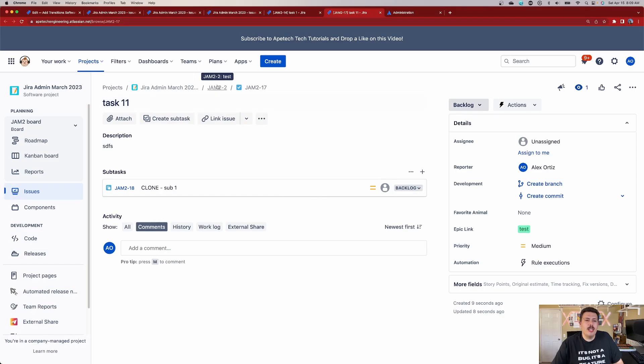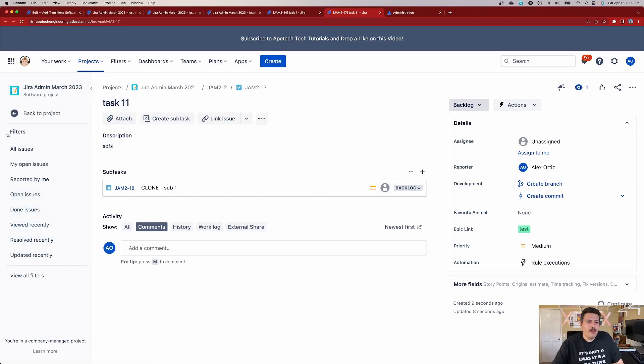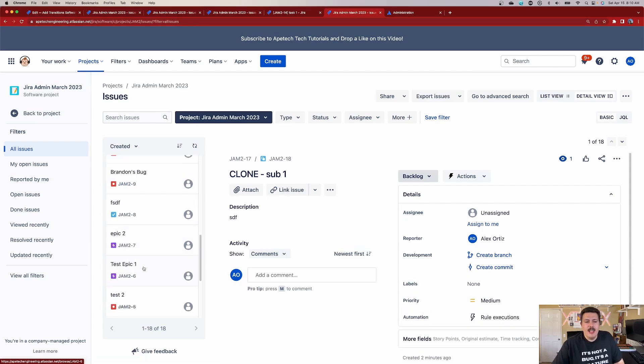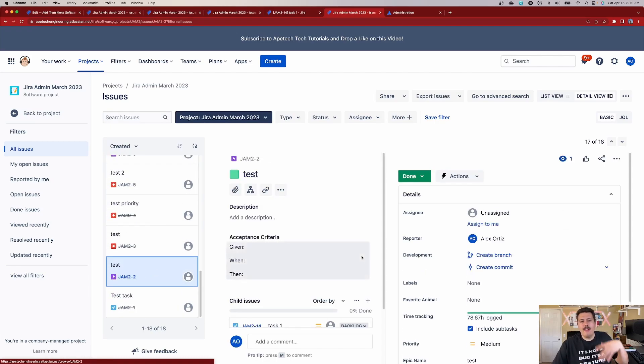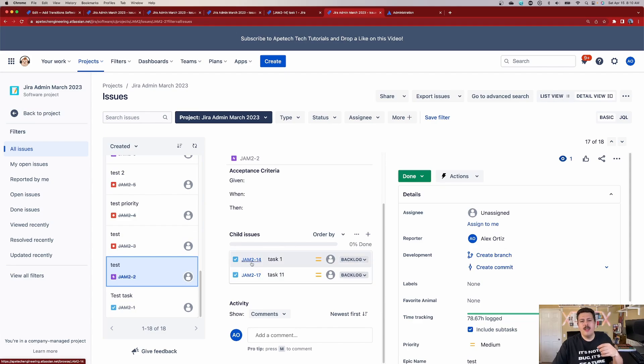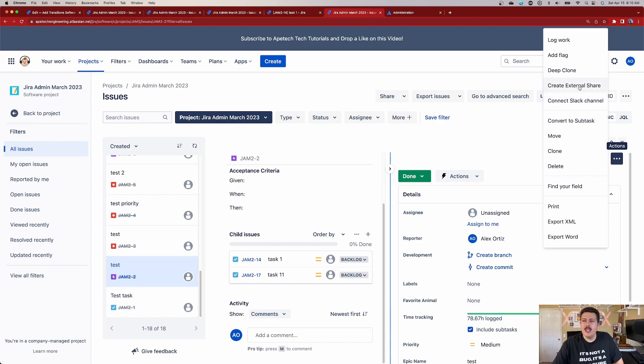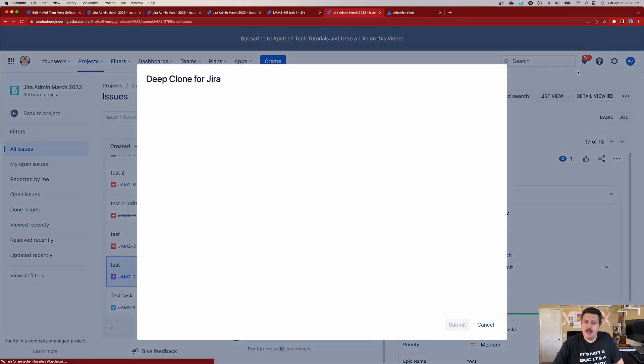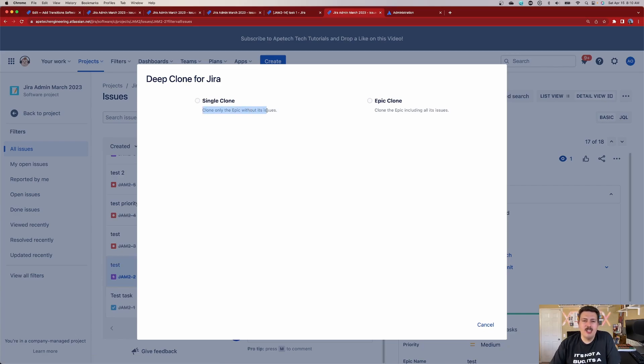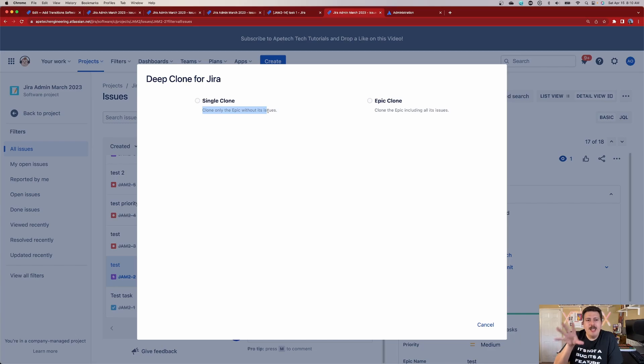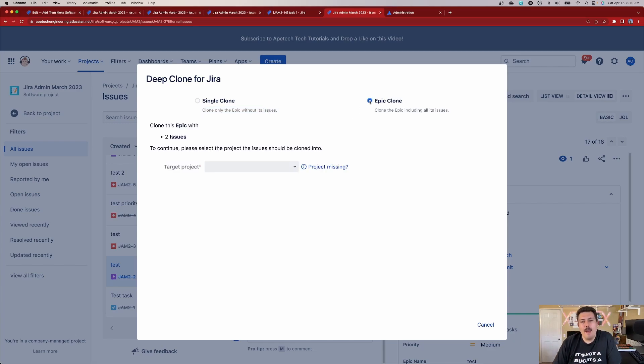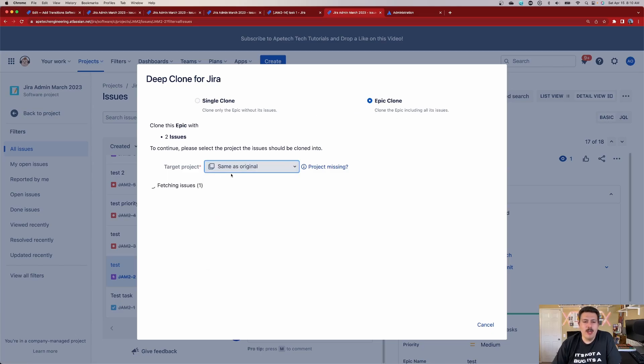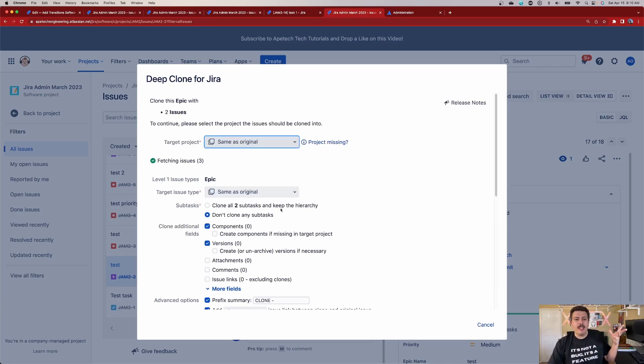In order to do this, I'm going to actually go back to an epic and I'm going to go grab the original epic that has all that relationship already created for me where I have the epic, the subtasks, the children, and then the subtasks. I am going to this time go to the actions and click deep clone. When I do this one, it's going to ask you, do you want to do a single clone? Well, that's cloning the epic without any issues, but I don't want to do that because we can do that for free. So don't buy deep clone if you're just going to pick single clone. We want to do epic clone. This is the reason why we're buying it. Because when you clone the epic and all of these issues, then you're going to be able to say where do you want to go? Well, we're going to go to the same project.